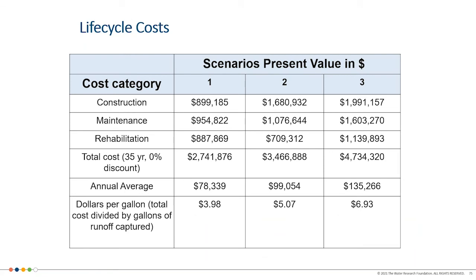And here's, again, the scenarios just determining from construction to rehabilitation. Rehabilitation just takes a portion of that construction cost and says, within a certain amount of time, you're going to face some rehabilitation. But then you also have the annual maintenance costs that include labor to materials, again, in that line item buildup. And you can see the total cost over 30 years.